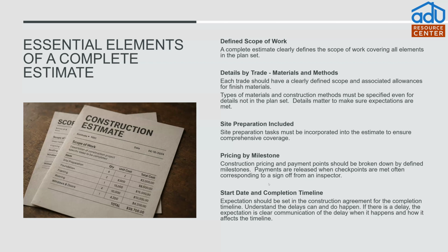Right. Site preparation must be included. This is one of those little red flags: if it's not on the contract, expect it to be a surprise extra cost. Site preparation is really important. If there was a tree there, those trees need to be removed. A little bit of grading to make sure that the yard is flat before we put down the foundations for the ADU. Make sure that is detailed out and added to your contract so it doesn't become a surprise later.